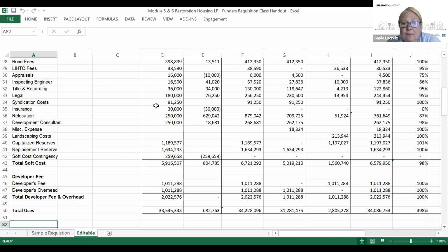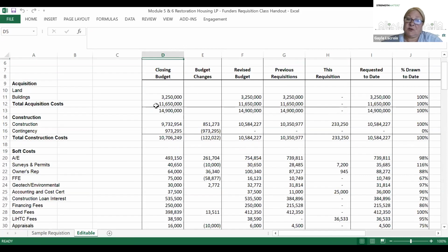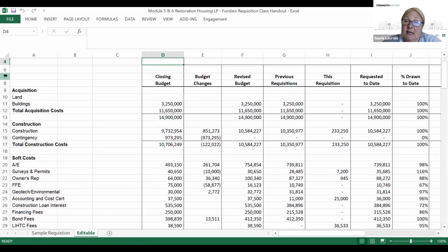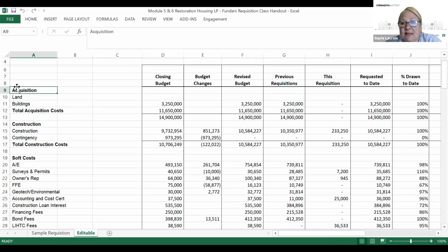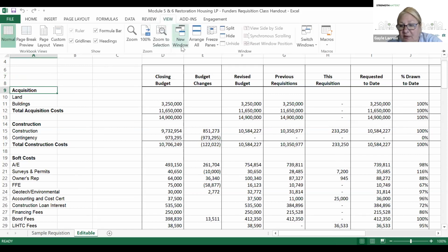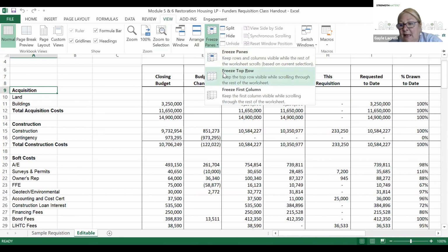It's possible. Yep. So different funding sources have different time requirements, and our state agencies have a window of about 4 days every month that they pay. You become quickly attuned to exactly what those 4 days are, that you need to have your documentation to them, that they're going to look at it and then they're going to pay. If you miss that window, you're out for the month.